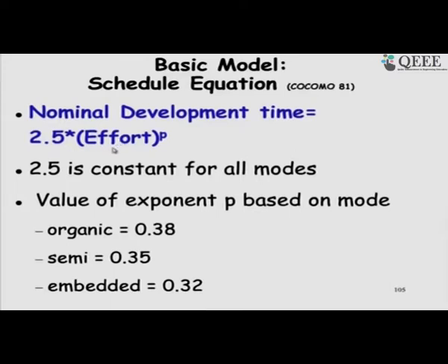See, the proper way, which we will see later today in this lecture, is that it should follow a Rayleigh distribution. So, there is an initial deployment of a few developers at the start of the project, and then as the project progresses we hire more and more people, and then towards the end of the project we reduce the team size. That we call a proper deployment of staff, and that leads to the minimal development time.